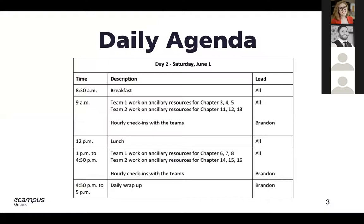We provided an overview of OER to the educators before collaborating on the ancillary resources we thought would be most beneficial to faculty. We connected with leading OER experts before our sprint to provide suggestions based on their past OER ancillary resource sprint experiences. From these discussions, it was decided to create test banks, slide decks, and mini case studies. The days were long and quite productive. We started with a group meal before separating teams to work on the ancillary resources. We ensured teams had their own rooms, as well as individual spaces when someone wanted to work independently. Scheduled breaks were not included in the agendas, allowing individuals to work at their preferred rate without interruption when they were on a roll. Each day ended with a wrap-up to discuss what was going well and areas of improvement.